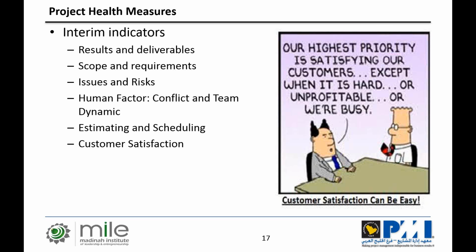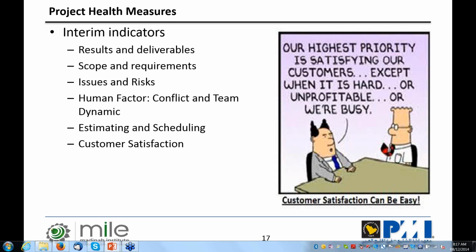These indicators are not good on their own. The only way to achieve them is to measure them over time, and then benchmark one project against another. So after, for example, 2-3 projects, I'm starting to have a trend about the number of changes that have been submitted per requirement. It can tell me the stability of the requirement, and then based on that, I can tell you, okay, where this project is heading. It's almost like with the economy that they have all sorts of leading indicators. These are numbers and measures that when they appear, we may be able to expect certain trends with inflation, employment, or whatever moving forward.